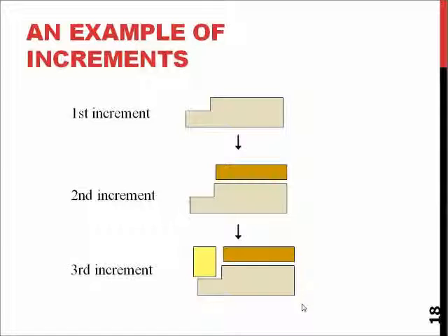You do the development for one incrementation in iteration, but with the incremental parts which support and add to each other, you just design things so that the first launch gives you the mechanics or the basic parts, the second part gives you the same campaign from the bad guy's point of view, and the third increment, the second expansion disc, gives you multiplayer mode or stuff like that. Whatever you want to do, and as long as these increments are economically feasible, you can more or less expect to be allowed to make money for your company.